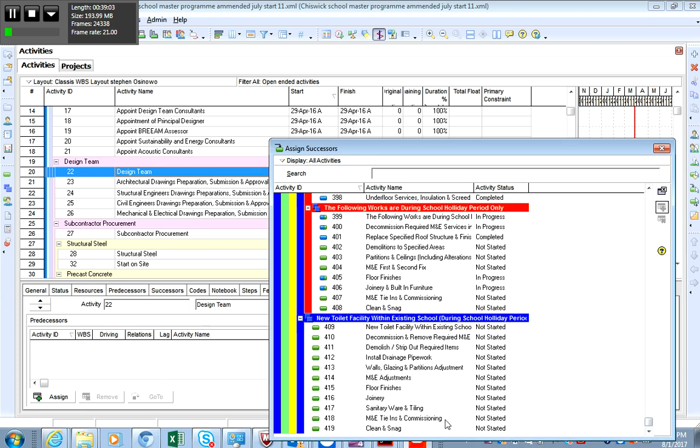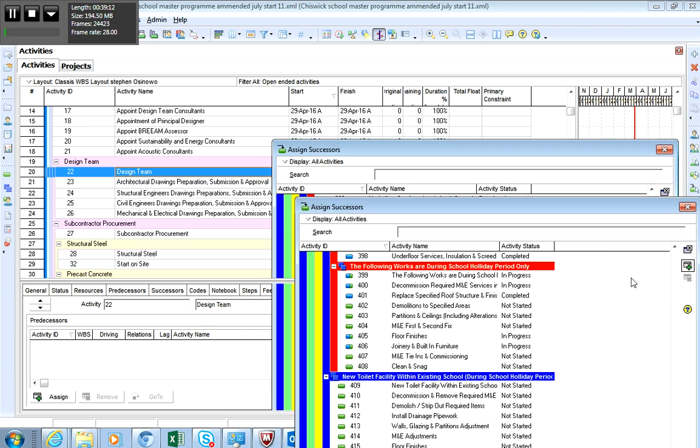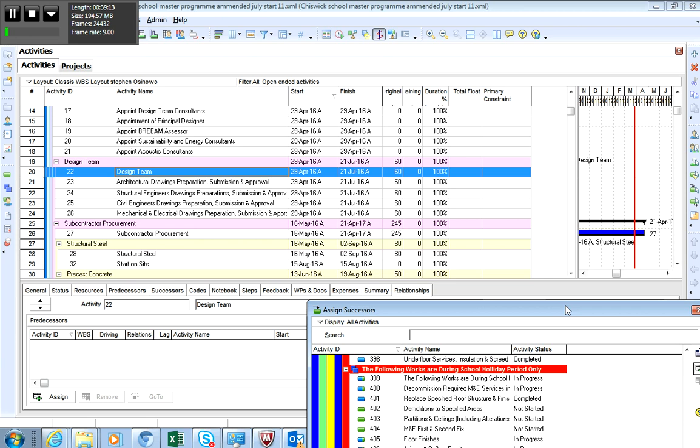Because you need to be able to schedule this program. If you can't schedule it, you have a big problem, right? You're not going to be able to calculate your accurate total float values, because you need your total float values to do a windows analysis.